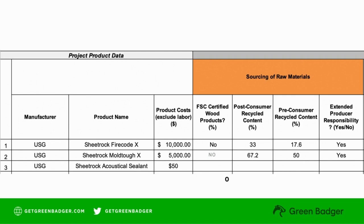As we fill out the LEED cover sheet, if a product is FSC certified, simply put yes. In our example here, there is no FSC certified wood product, so we put no. If the product has recycled content, you would fill out very specifically the post- and/or pre-consumer recycled content. In addition, if the product has a take-back program, simply type yes under the extended producer responsibility field. And don't forget to include the supporting documentation.